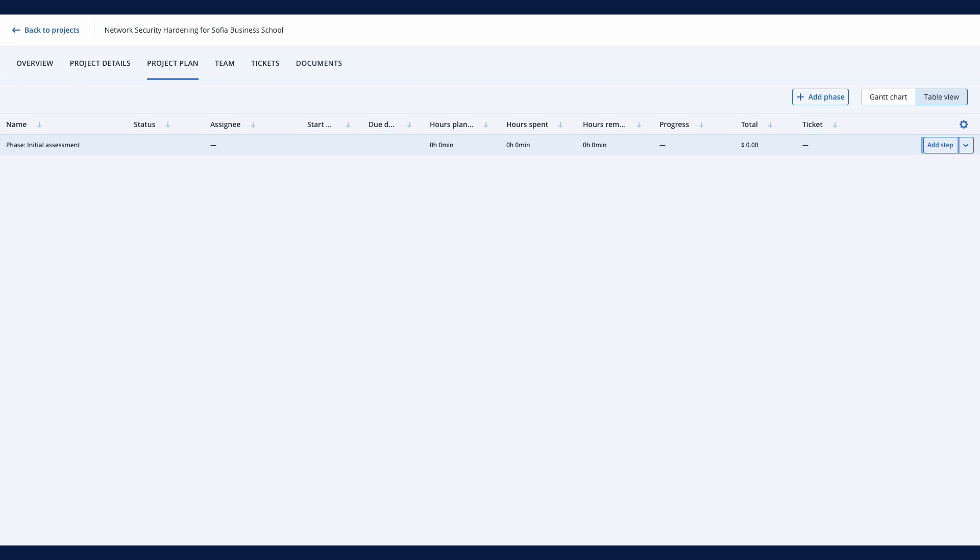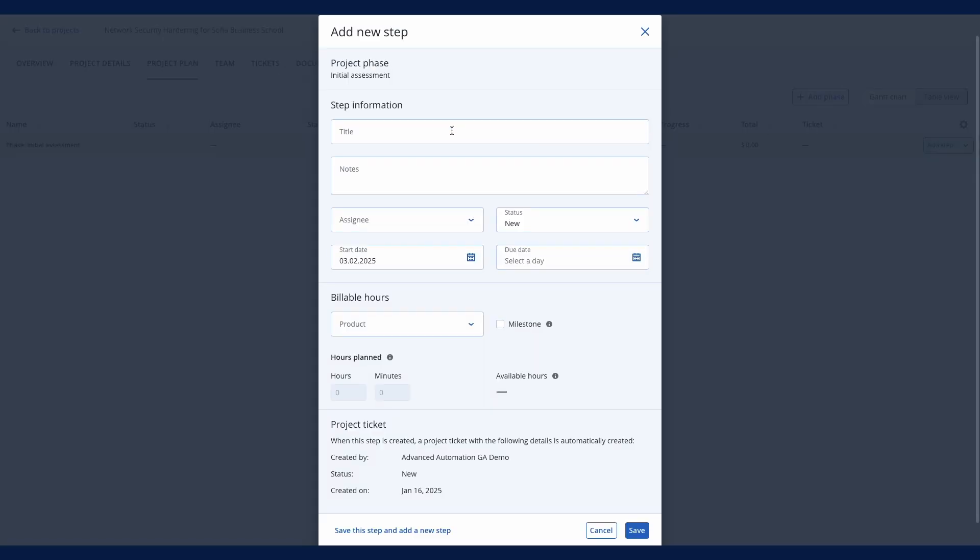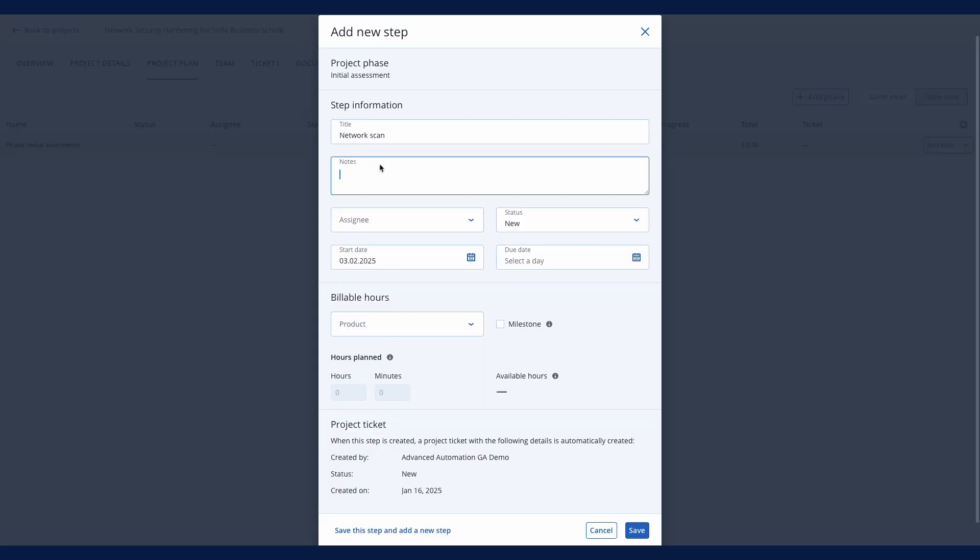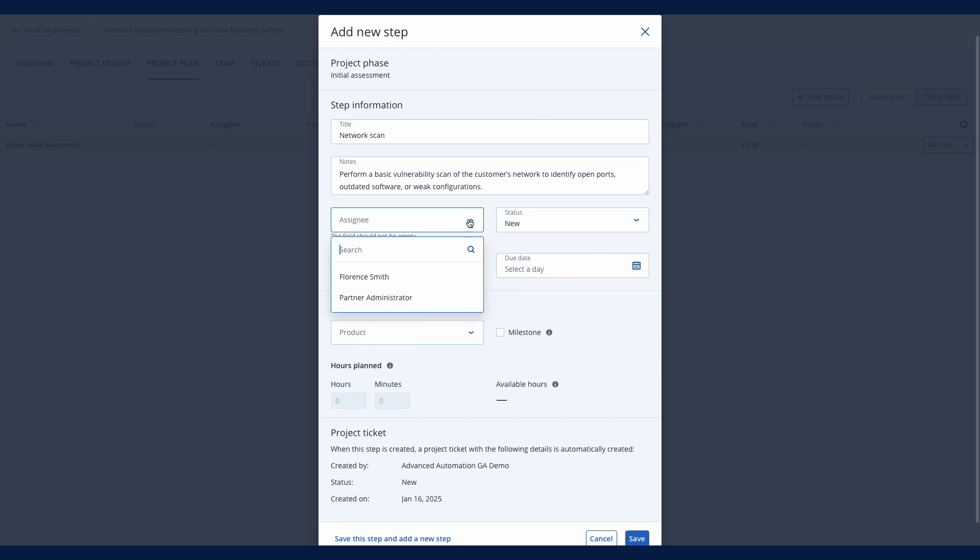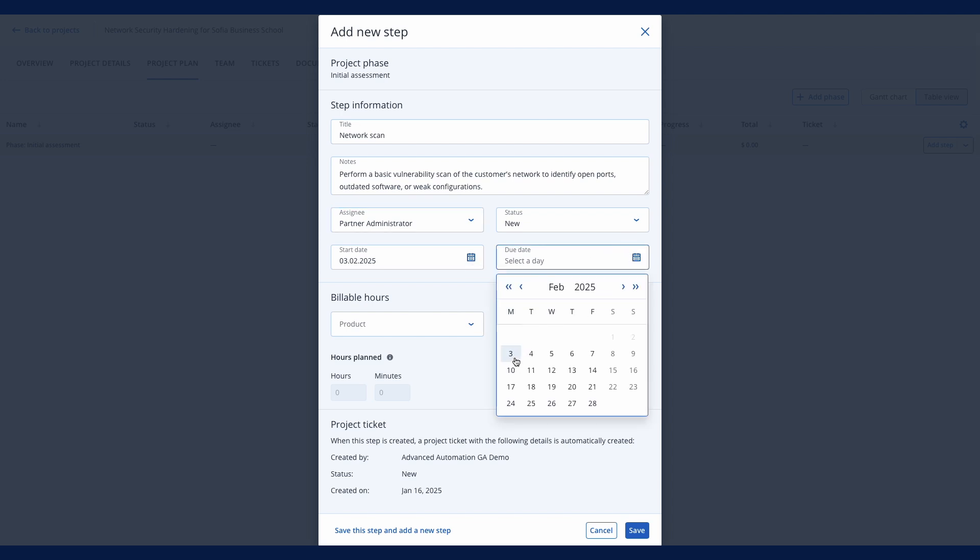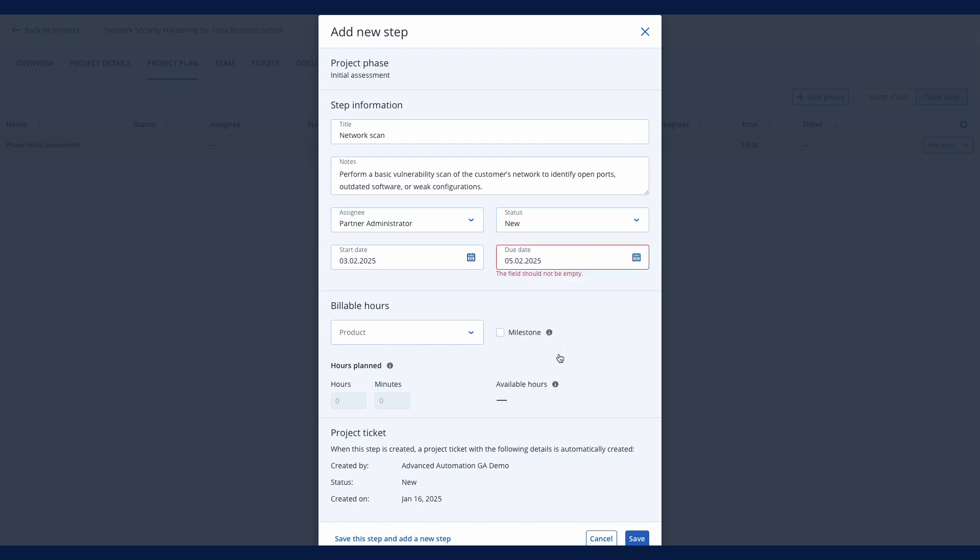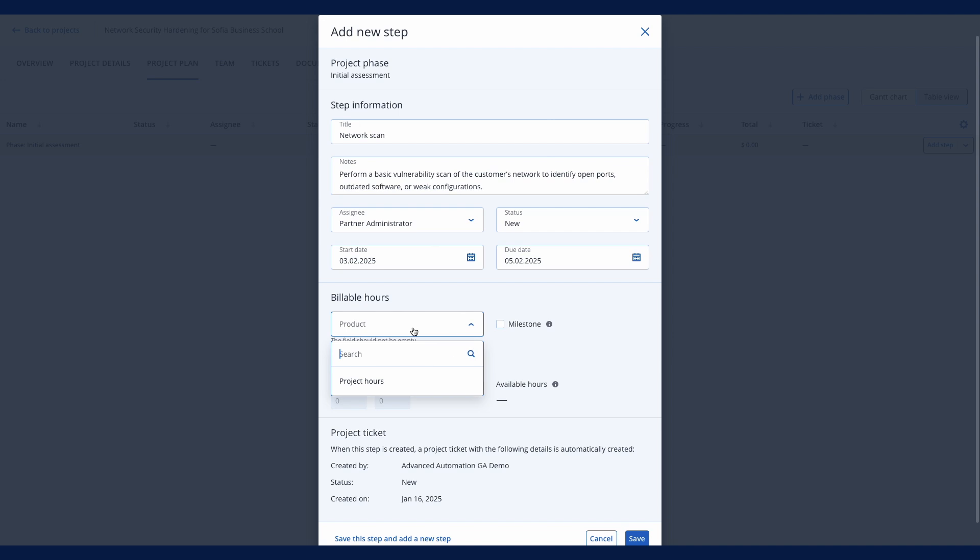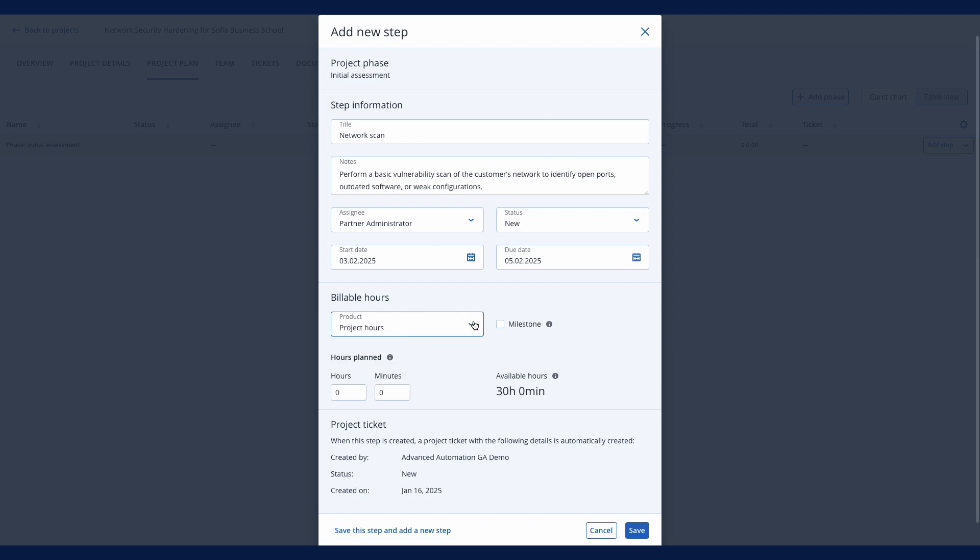Let's create one. Provide a title and optional notes for your technicians. Assign the step to one of your engineers from the project team, and define start and end dates for the step. For billing purposes, assign one of the project products and specify the number of hours allocated to this step.